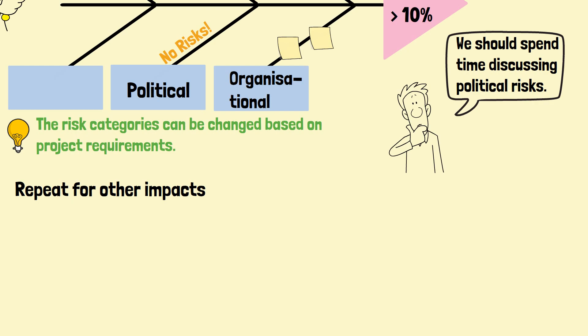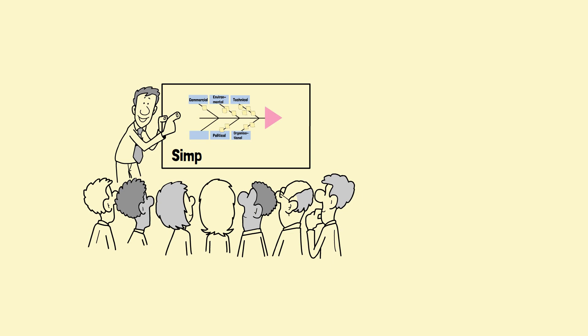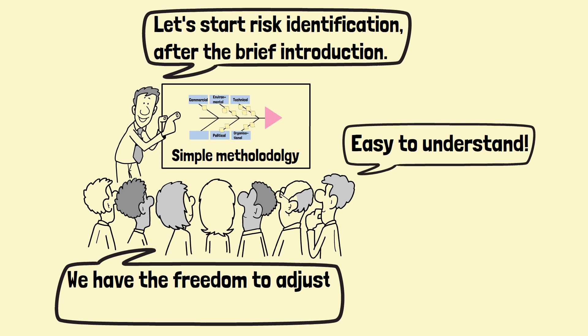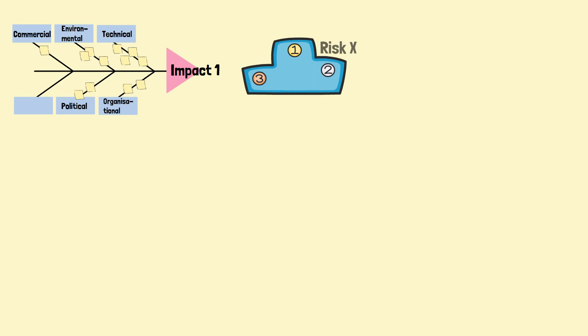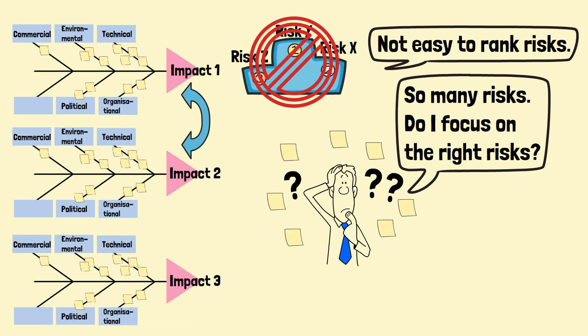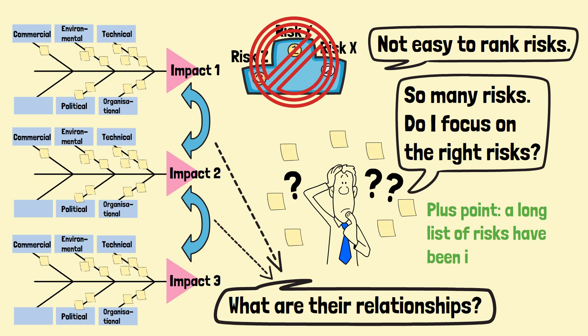The main advantage of the Ishikawa Diagram is its simplicity. Everyone can quickly understand the process and start contributing to the discussion. The structured approach allows adjustment of the diagram for accommodating different types of risks. However, the simple method cannot prioritize and rank risks, and participants may put energy on risks that have less impact. Moreover, it will be more complicated if there are a few fishbone diagrams for different impacts. Nevertheless, it meets the requirement of identifying risks.